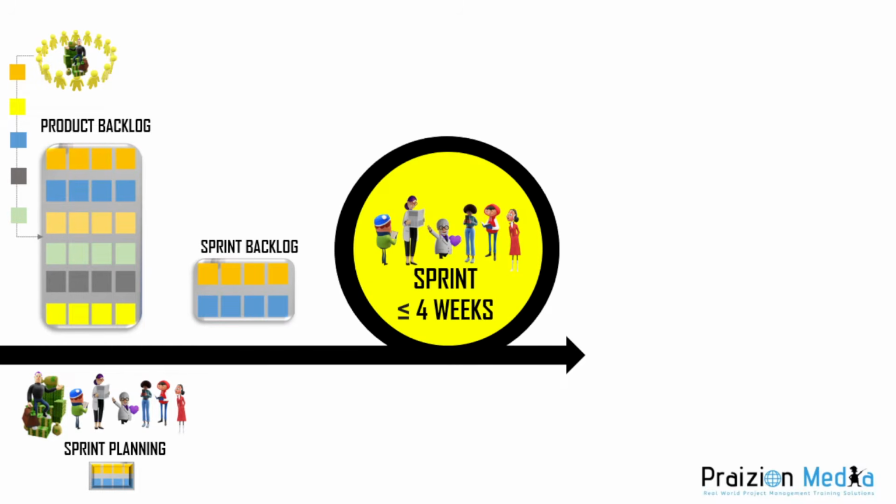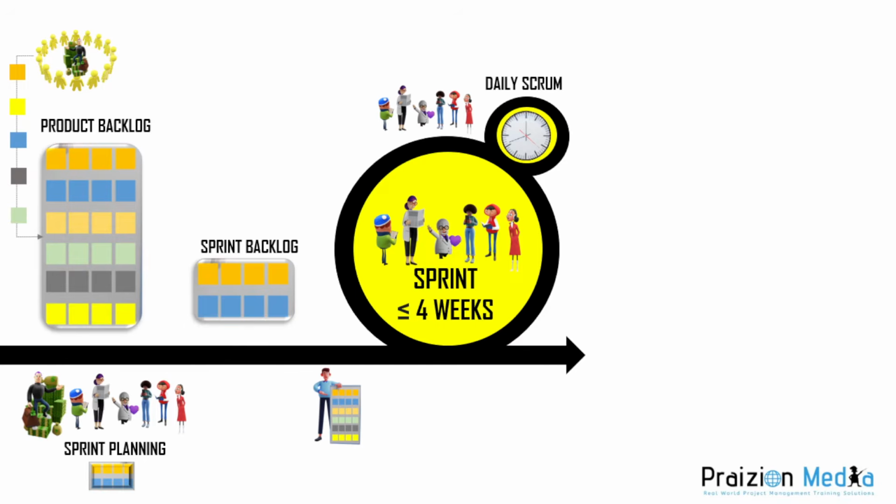The sprint is 4 weeks or less, and every day of the sprint there's going to be a daily scrum where 3 questions are asked. What did you do yesterday? What are you going to do today? What are the impediments that are in your way?